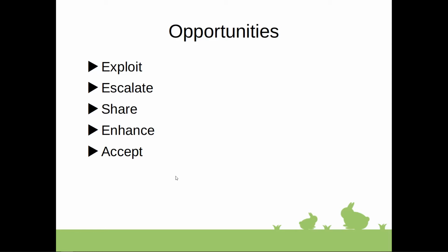Escalation, similar to threat management, will be used whenever an opportunity is outside of the scope of the project, or the proposed response would exceed the project manager's authority. It will still have an impact on the project, but would have to be dealt with by a higher authority.